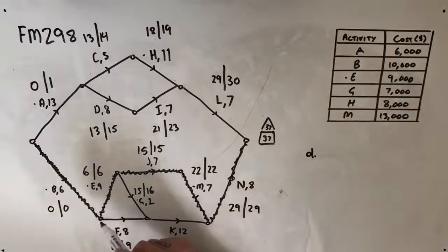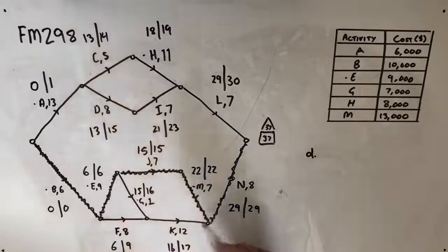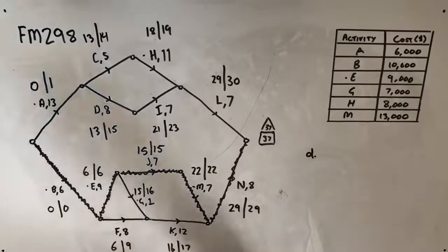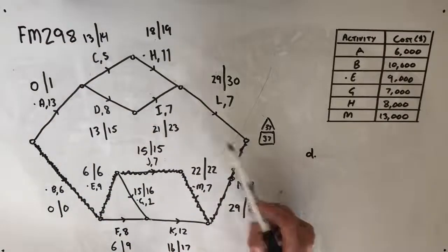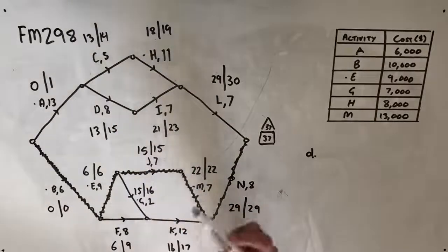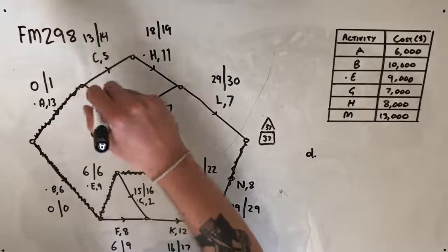What would happen if we reduced E is that everything after it would keep its float times, so activities G and K still aren't on the critical path. However, this whole path here now takes 36 days, and everything that wasn't affected by E being reduced, that had a float time of 1, is now also on the critical path.